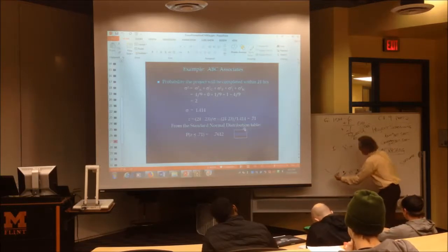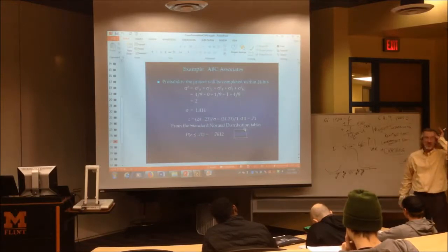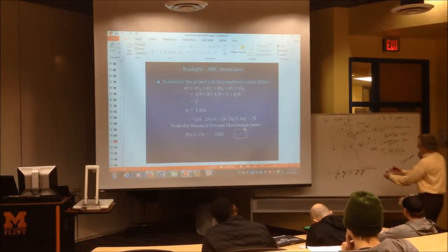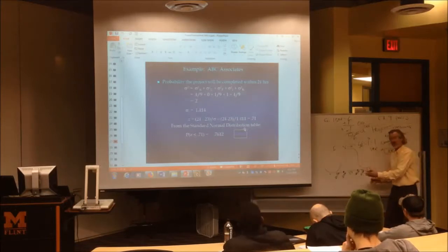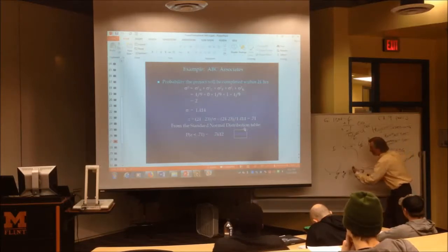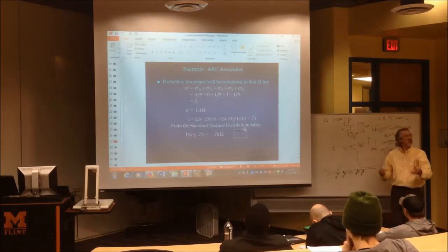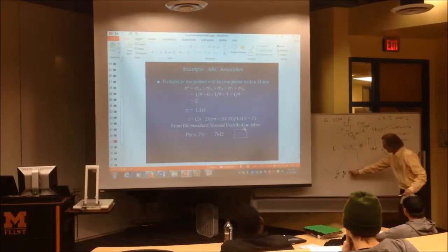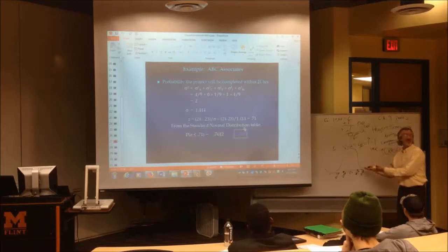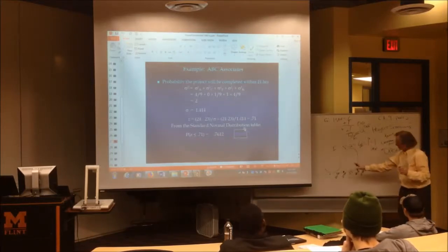Okay, here we go. 3 standard deviations, way out here. You don't even put those numbers. Now look at this. If I said to you, what's the probability this is going to take 23 units of time or less? Look at where 23 is. Dead center. So you know if that question comes up, the probability is 50%. If I said to you, what's the probability of 23 units of time or more? That one's obvious. It would be 50%.